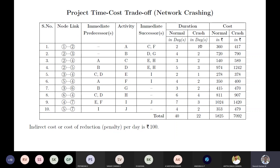Think of crash duration like a 30-day crash course version of a semester class. Normal cost is the cost associated with normal duration, whereas crash cost is higher because if you want to reduce the number of days, you have to provide maximum or additional resources, and that incurs extra cost. That's why crash costs are always higher than normal costs. The indirect cost or penalty is 100 rupees per day — covering establishment charges and contingency charges.